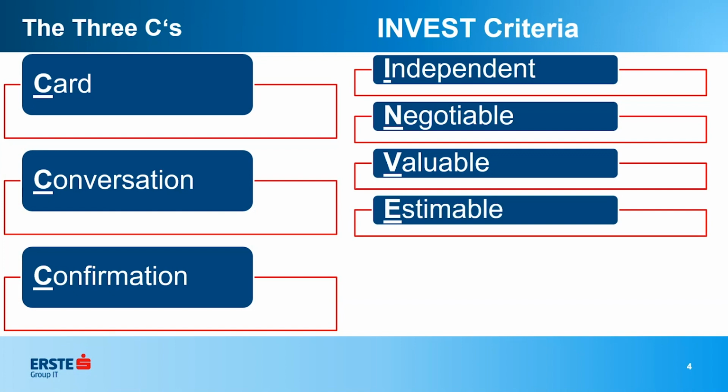So the team should be able to have some idea of the size of the story, right? Even if your team doesn't do estimates right now, if they had to say this is small, medium, or large. If your team has never done estimates before, and they're refining a story, at the very end you should be able to say, okay, you guys, compared to everything else in the backlog, do you think this story is small, medium, or large? And if somebody says small and someone says large, there's probably still some discrepancy and some questions that need to be answered about that story before you move forward.